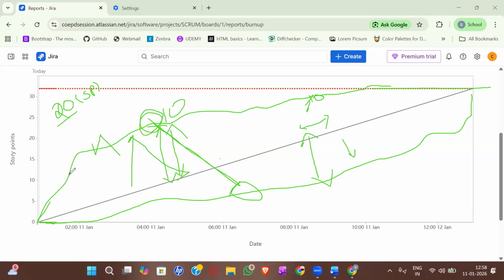So then their completion progress will be well above the standard imaginary line. That means they have overestimated the complexity of a user story. This is an issue because of overestimation; they said 20 will be more than enough. But during implementation, they feel 20 is very easy, which means they can have at least 10 more for that sprint. So this makes less burden for the upcoming sprints. So this overestimation is a problem for us.